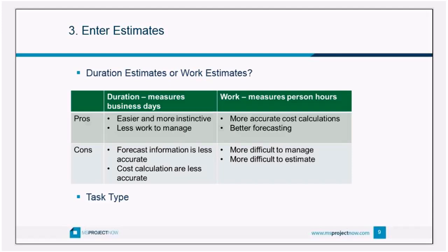Estimates are usually made as either duration estimates — how many business days does it take — or work effort estimates — how many person-hours are required for this task. Estimating in work is much more accurate and gives you better information, however it's also a lot more difficult to gather from people and to have them update how many hours they've spent and how many hours remain.